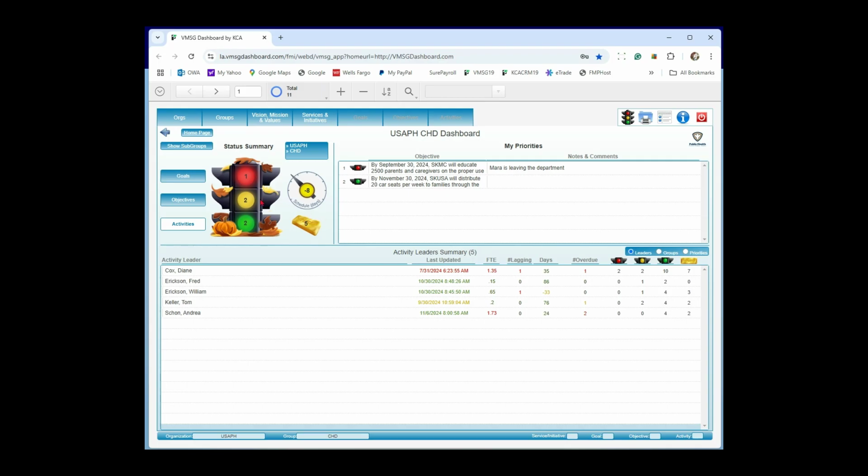Now, if we have another one of those activities that is 60% complete halfway through the year, it's 10% ahead of schedule. So again, 36, 37 days. So those two would balance out to be zero, basically. So what it's doing is adding all those together and saying, in aggregate, we're 8 days behind schedule. Doesn't mean everything's behind schedule. It could be, but probably not at this point in time.